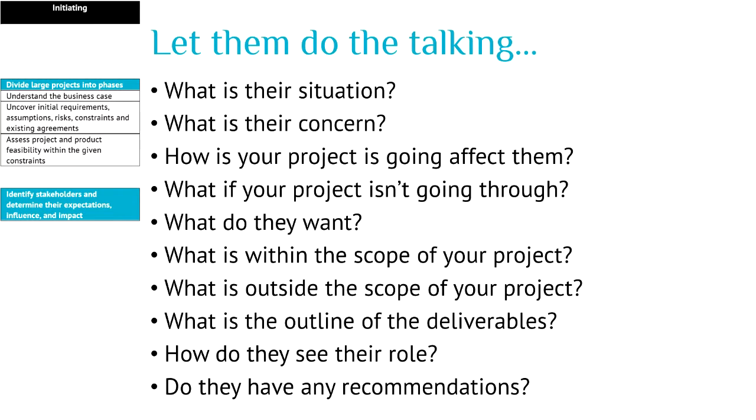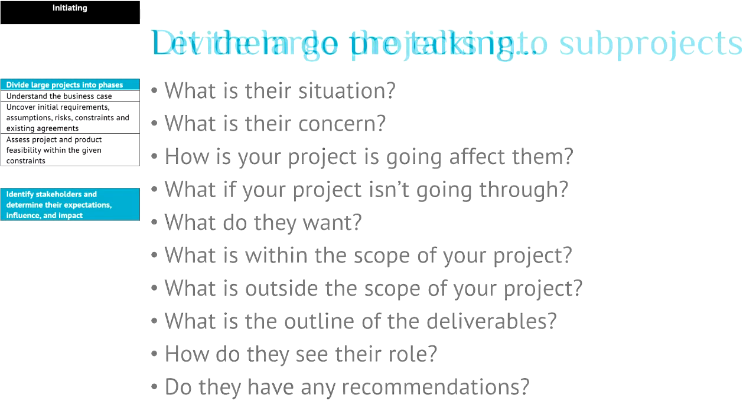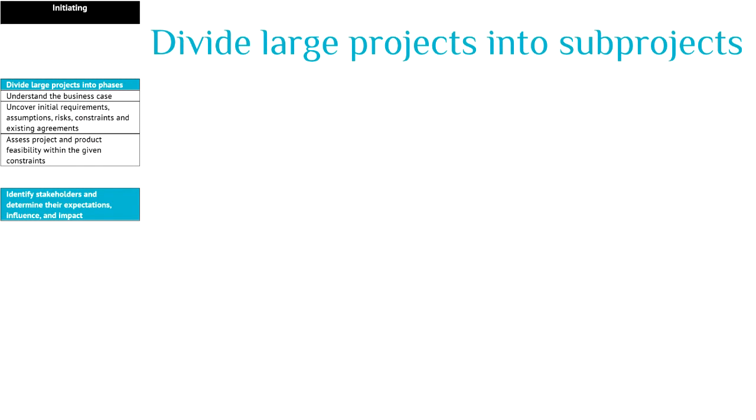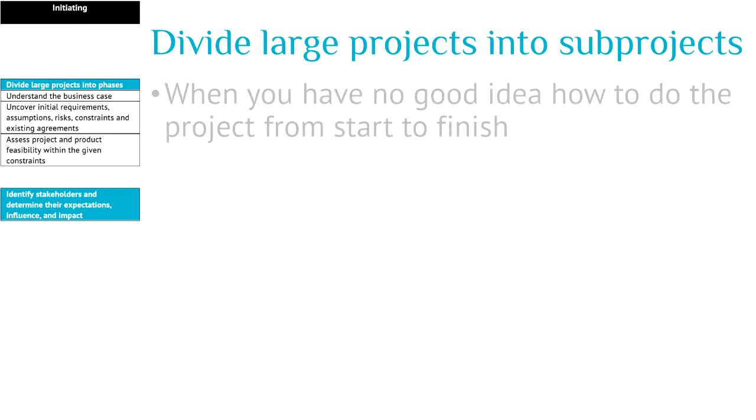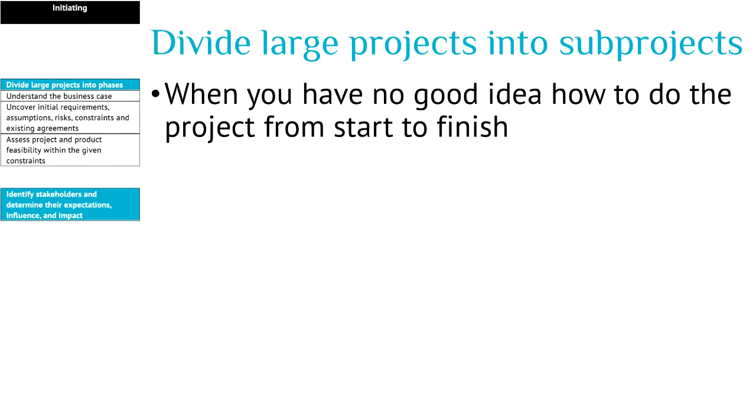Once you have a better understanding of the project, you have to think whether you must divide your project into smaller projects, yes or no. Reasons to divide a project into smaller projects is when you don't have a good idea about how to do the project from start to finish.